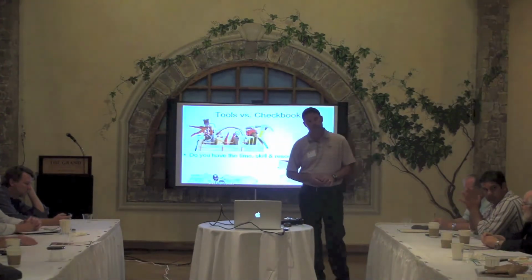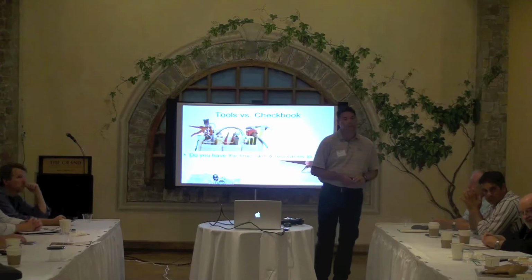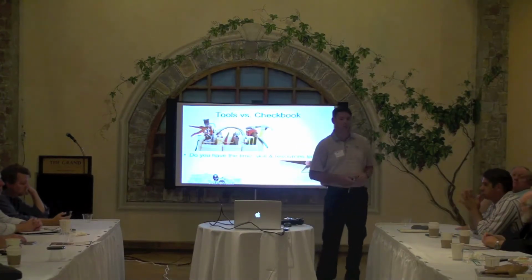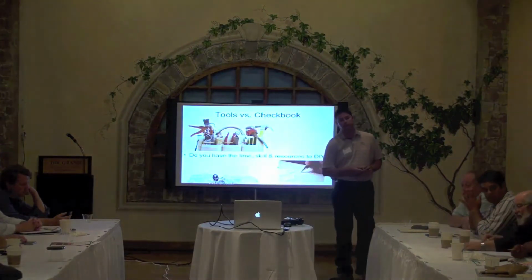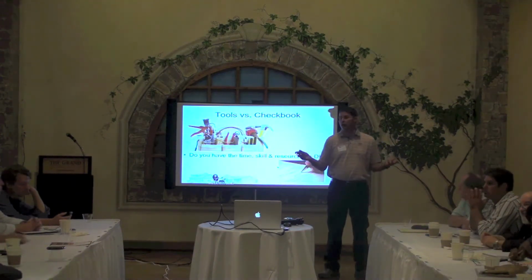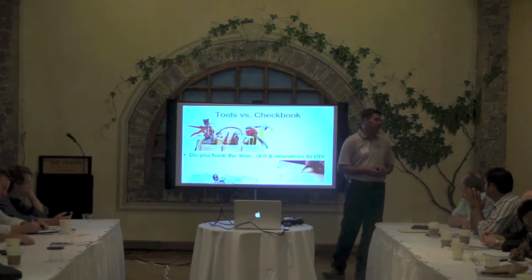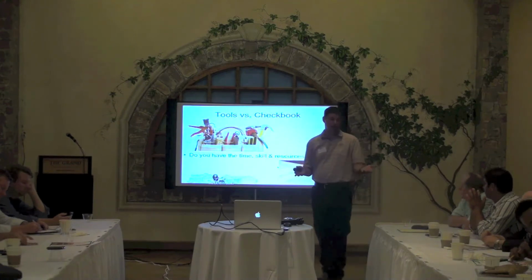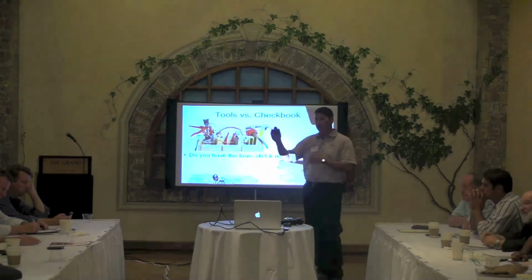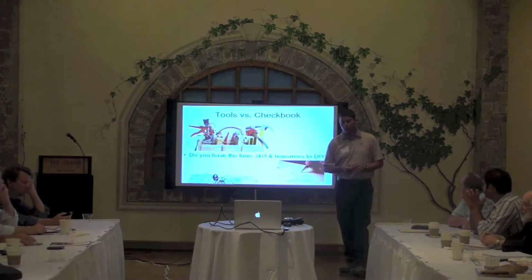If you got an old place with a lot of visible problems, you're going to want to use 20% probably. If you got a pretty neat place and there just might be something, 10% is probably enough. Good point. So you have to adjust the risk to match the circumstances. Think about it: you have a $400,000 remodel. Are you going to put a 20% buffer or contingency on it? You might, depending on the condition of it. Maybe you need that much more, because when you get into a bigger remodel or rehab, a lot of things can go wrong real quick.